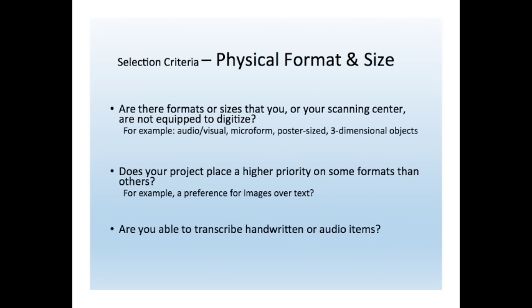Your project might place a higher priority on one format over another based on the objectives and intent of your project scope. For example, if your project has a storytelling objective and you want to create online exhibitions, you'd rather have more images than text. There are also practical elements — if you have materials that are handwritten, there are issues around transcribing that. Handwritten objects digitized can't be processed with OCR — optical character recognition — so they are not keyword searchable unless you add a transcription. The extra time and expense of transcribing handwritten diaries, letters, postcards, or ledgers is a pretty important piece to factor in.